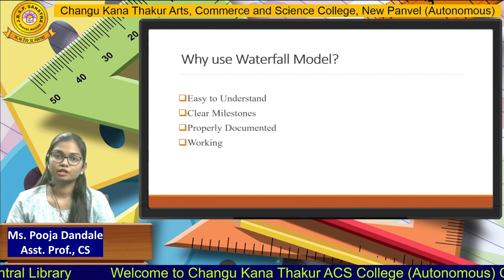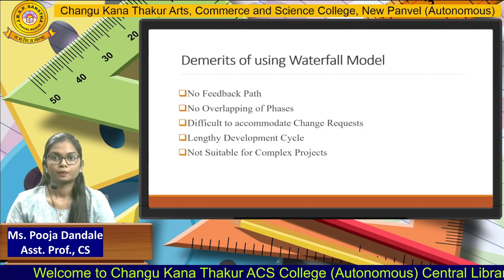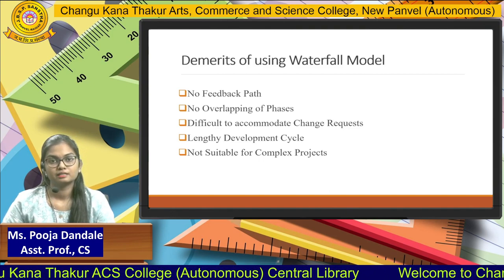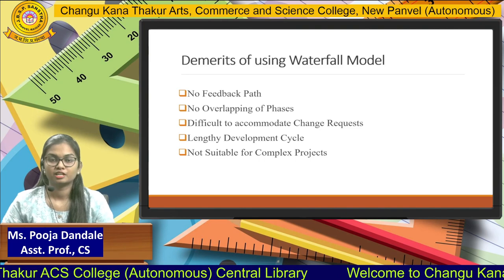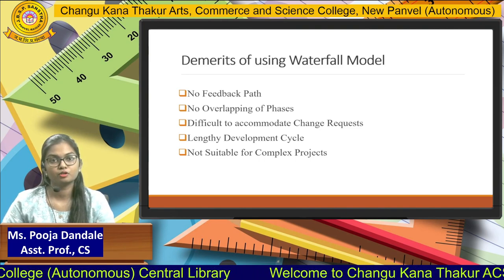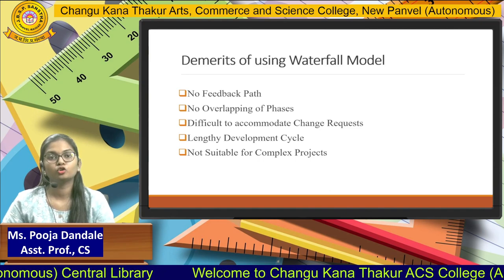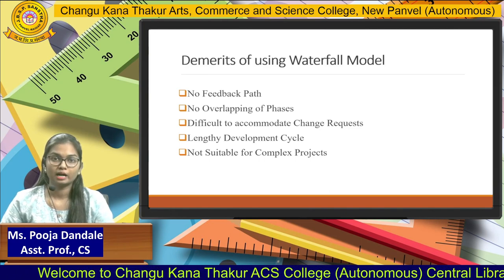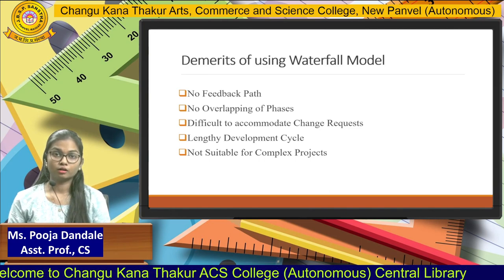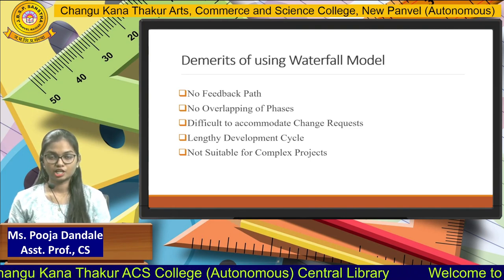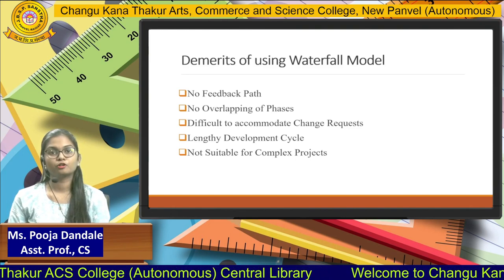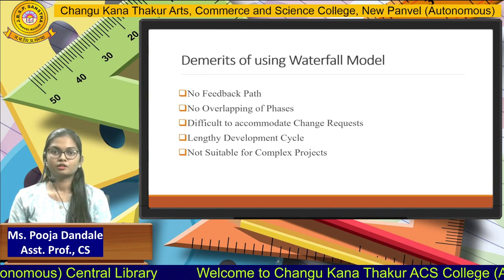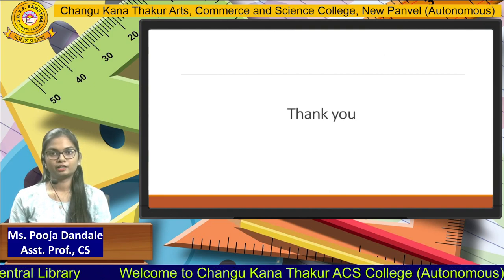The demerits of the waterfall model are: since we go step by step phase by phase, once we move from one phase to another you cannot go back. It will be a very lengthy process, there is no overlapping of phases, and it is difficult to accommodate change requests in the middle. We have to wait for all things to be done before making changes. That's all for the waterfall model, thank you students.